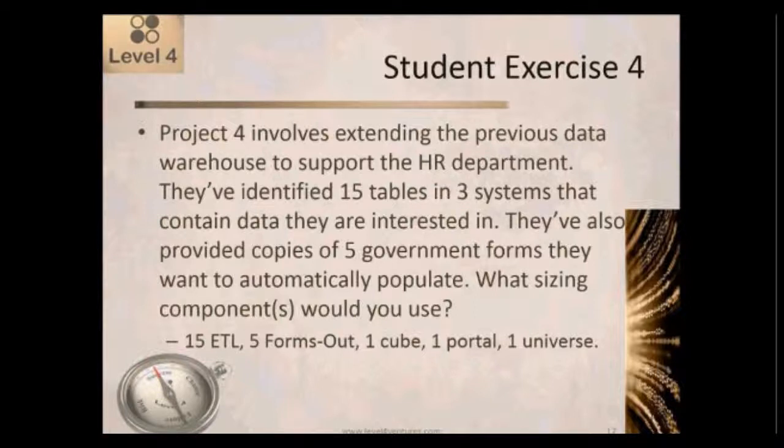And another thing, and this is more of a project management than an estimation thing, although it's kind of in the gray area between. Generally speaking, it's best to try to get the people who own the source data to be the ones who have responsibility for the extraction component of the ETL. The reason I say that is because they're going to be the most familiar with the data, the system, and so on. So they're going to be able to extract that data in the most efficient manner possible.